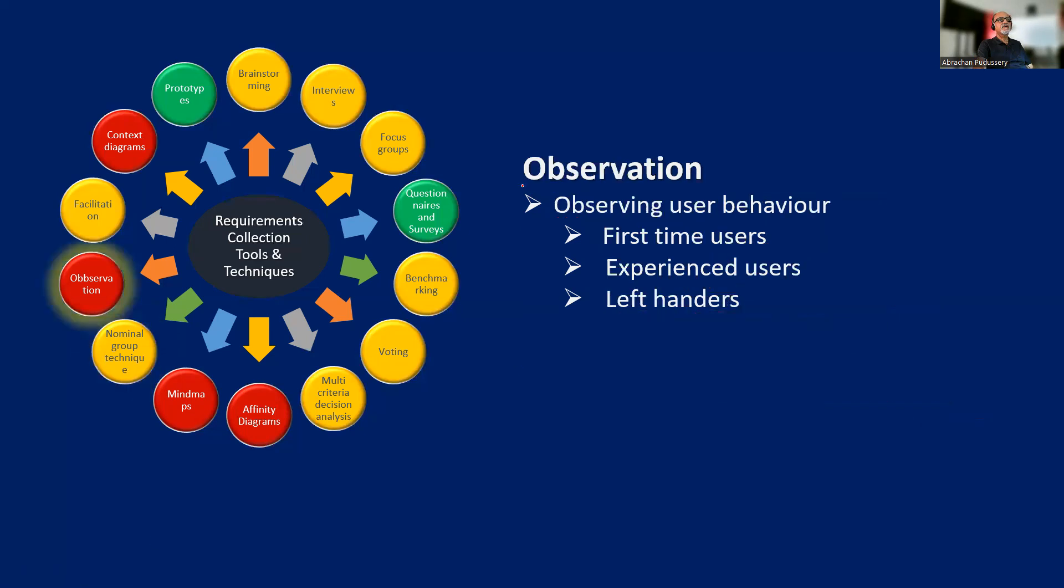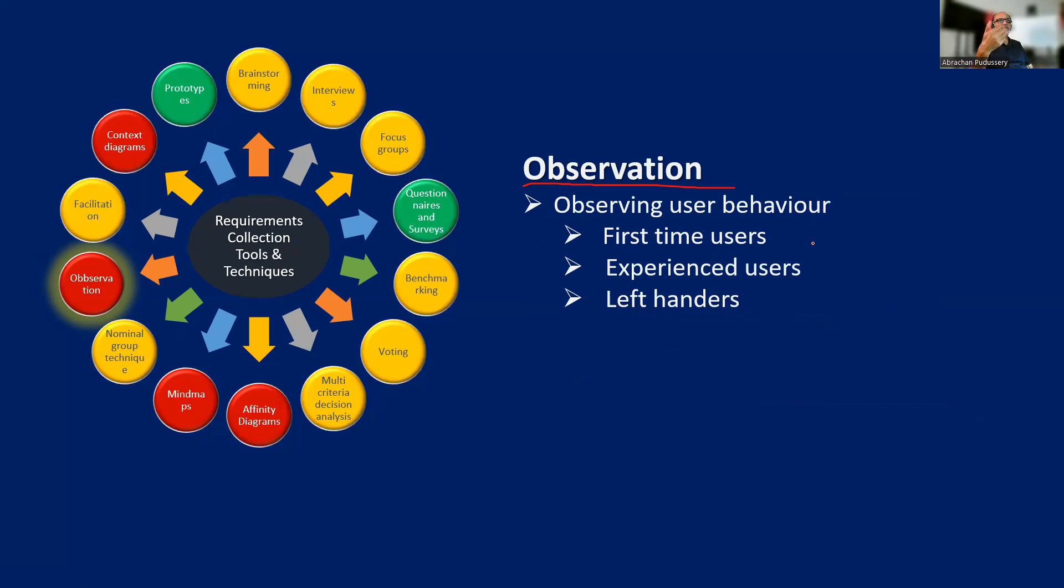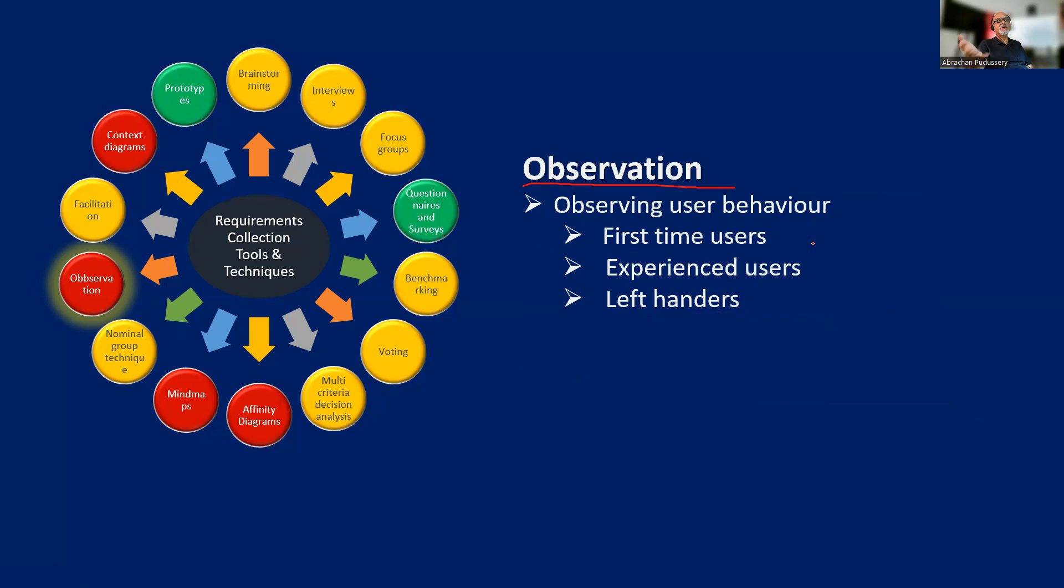Then observation - observing user behavior. For example, after creating a prototype, we can observe how a first time user is using it or how an experienced user is using it, how left-handers are using it, how right-handers are using it, how elderly people are using it, how youngsters are using it. So based on this observation, we can fine-tune the requirements.